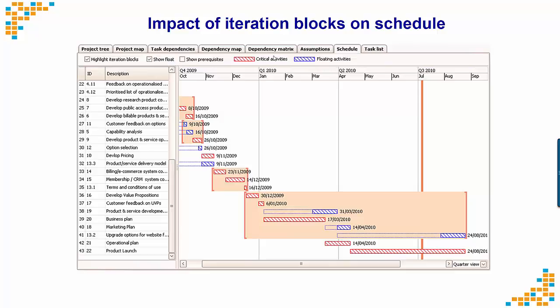If we have a breakdown in our assumptions which we've made, we might see those activities repeated because they are in a codependency block. And so you can see here, this is one area where the DSM analysis helps us identify the risk in our project for activities which might not be on the critical path, could still affect the critical path by their feedback in the dependency loops.